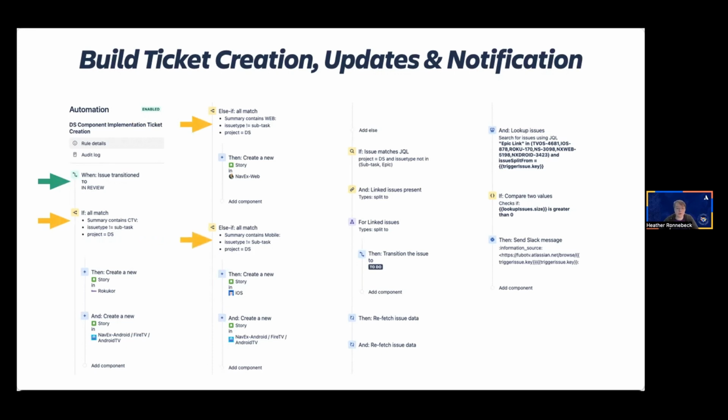And this is where the conditions component came into place. So really what we were checking for here is for the CTV types, the web type platforms, or the mobile type platforms. And we also wanted to make sure that if none of these if statements sent a true response for any subtasks, we filtered those out.